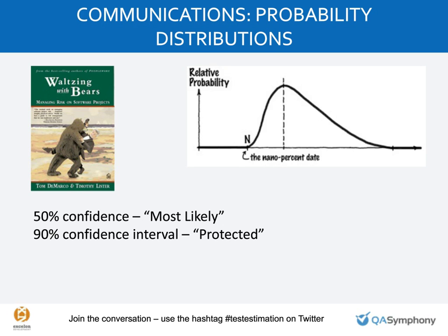Steve McConnell came up with this idea called the cone of uncertainty. There's a lot of criticism of it in the research. But the basic idea is that at the very beginning, we really don't know anything about performance. And it's a huge separation between the possibilities, how long things could take. And over time, as we know more, that'll come closer together. That cone will decrease.